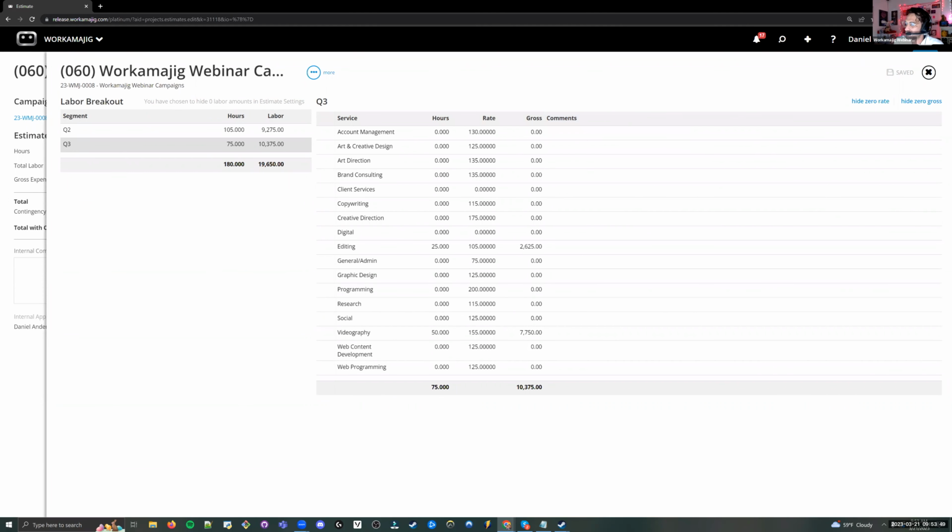And that's something meaningful to mention from a reporting aspect. If you're building estimates by service only, we don't know at the campaign level how you want that budget spread among projects, right? It's just saying, hey, I have a bottom line figure here, this $19,000 that I'm going to track the actuals against from all of the projects that come in. So when we're looking at a budget screen, it will let you know, hey, you've got X number of actuals in this project, but you won't necessarily see a project budget from a campaign side at that level.